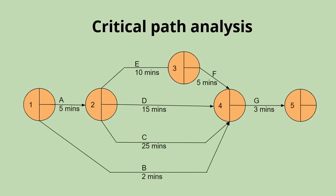Once we've drawn up the network, we need to fill out the earliest start times and latest finish times. We calculate earliest start times by adding up the longest activity durations. We start at node one with an earliest start time of zero. Adding the preparation of ingredients (five minutes) gives node two an EST of five minutes — the earliest time we can start cooking the sausages, bacon, and beans. Moving to node three, the beans take 10 minutes, added to the five minutes EST, giving an EST of 15 minutes before we can start frying the eggs.